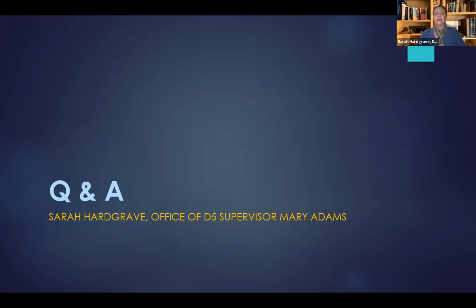whether understanding you can't give a definitive answer for completion of all homes until you get more information, if people sign up at historical averages, I believe you said a 75% opt-in, what is the rough estimate for completion of all homes? So I'm assuming that's a time estimate for being done. I'm not sure who can answer that question. I'm happy to if you'd like. With that estimate, I would say we would probably be complete within 3 months. If we start December 1st, and again, there are so many different factors like how many do actually sign up, how quickly they sign up, weather conditions, with rains and whatnot that come in, access issues we may have, but I think 3 months is a good estimate.